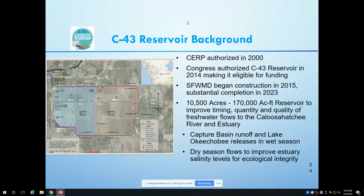The feasibility study's primary objective is to look for opportunities for additional nutrient load reductions. I think James had said we're looking at pre-treatment and reservoir treatment and post-treatment or combo thereof, because often a treatment train is more cost-effective and you get greater benefits. The goal of the study is to come up with a minimum of 3 conceptual alternatives. They've got to be cost-effective and technically feasible, conventional or innovative technology.